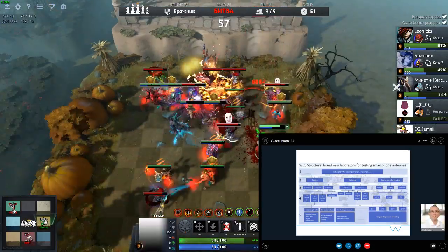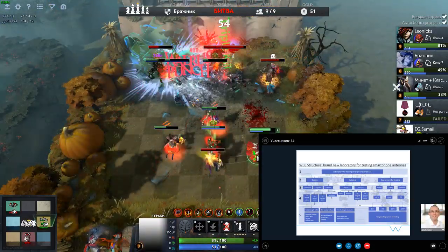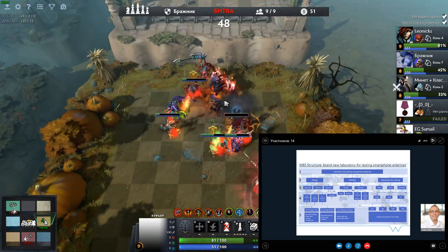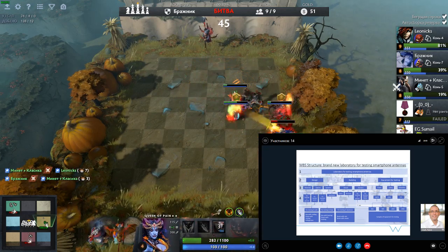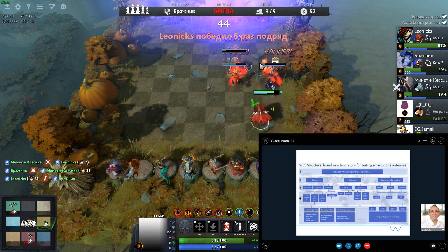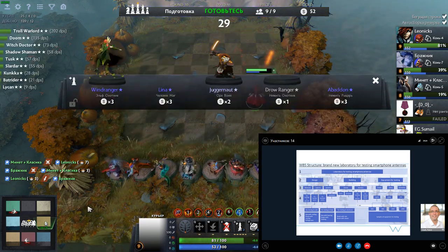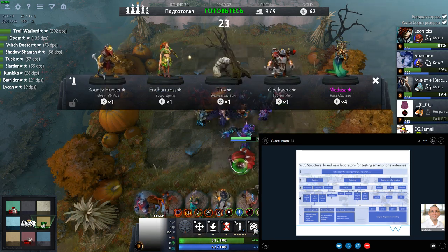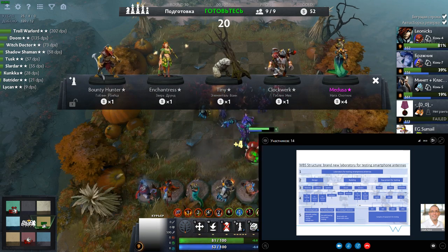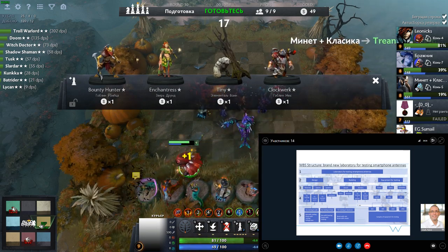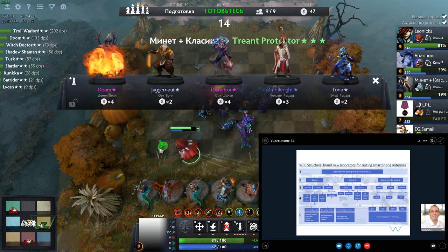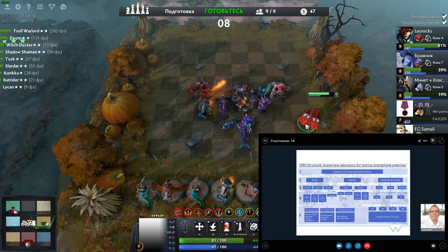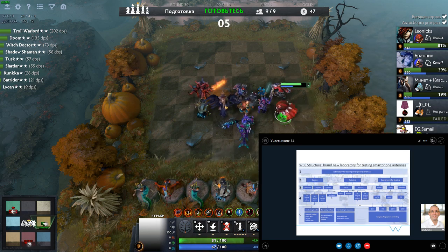Yeah, what I'm saying is the building and the equipment for testing, they're objects. They're objects that when you bring them together, they can produce the laboratory. The design is almost embedded within those two elements. And if you want to consider it that way, you could consider the aspects of design that need to go into the production of the building or the production of the equipment for testing. You could consider that down at the layers further down, so 3, 4, 5 and below, and you don't necessarily have to have it out there as an explicit item on level 2.